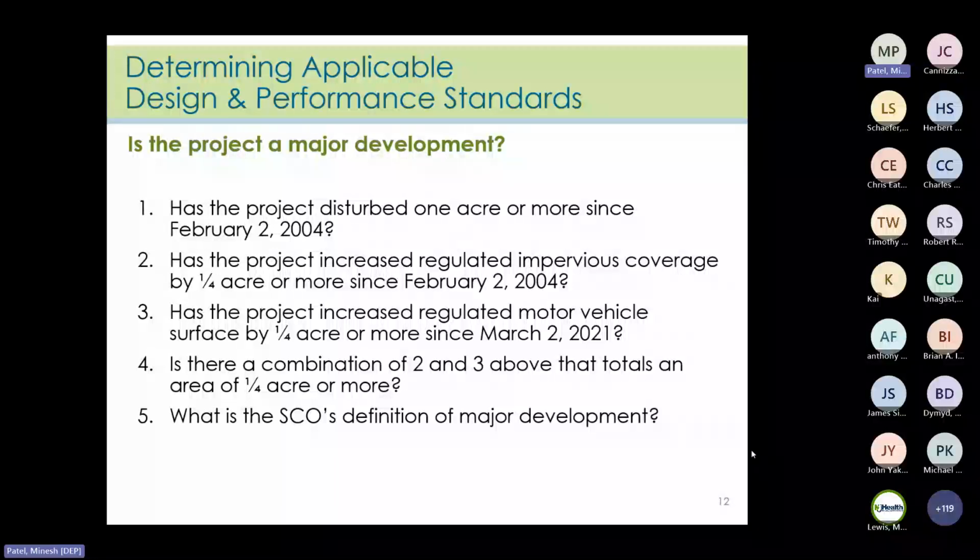So you saw this slide earlier in Module 1 in the overview presentation. Always check whether the project meets the definition of major development, because there could be the chance that it might not. Also be sure to check the permittee's definition of major development, as it may be stricter than the department standard. To find that, the reviewer should check the permittee's ordinances.